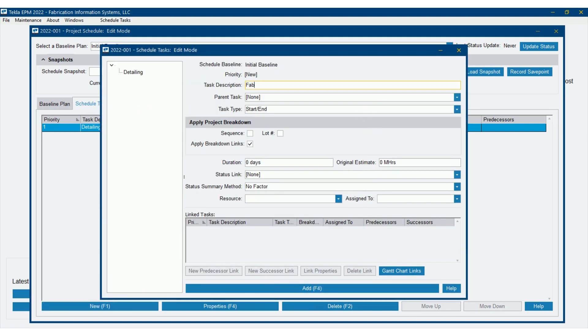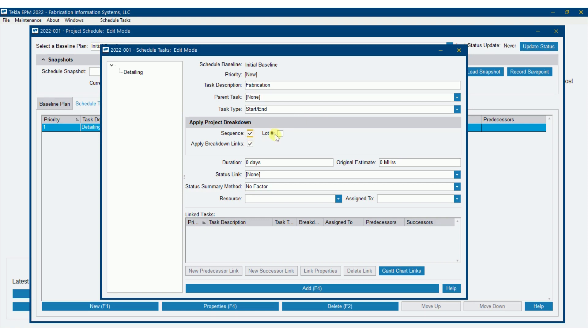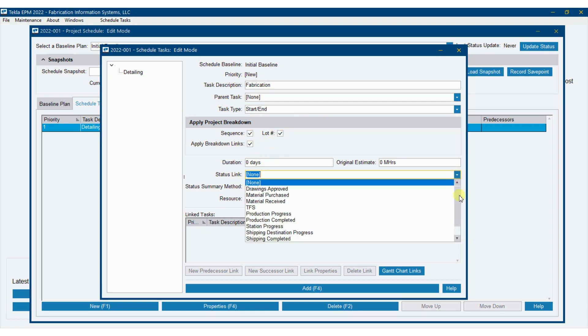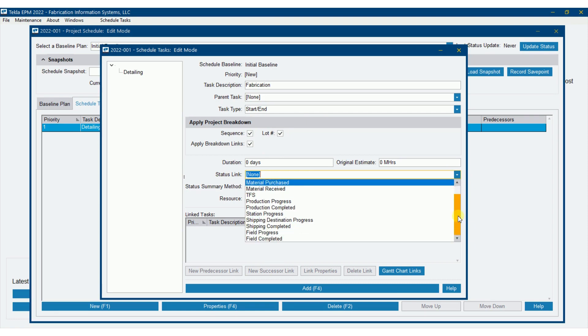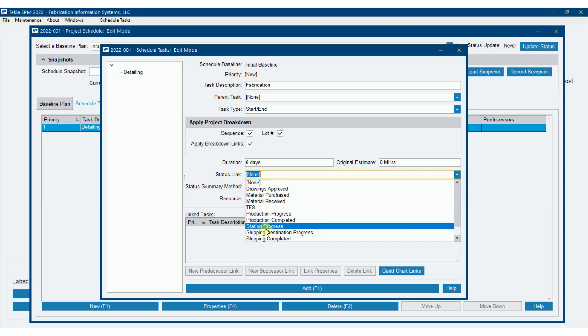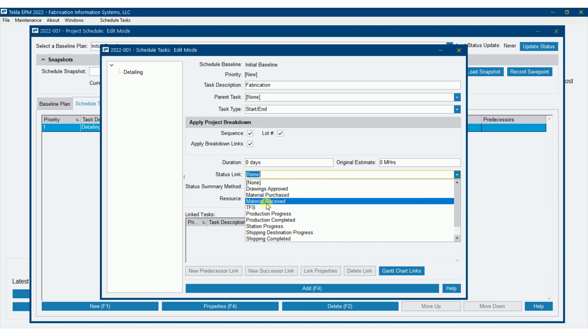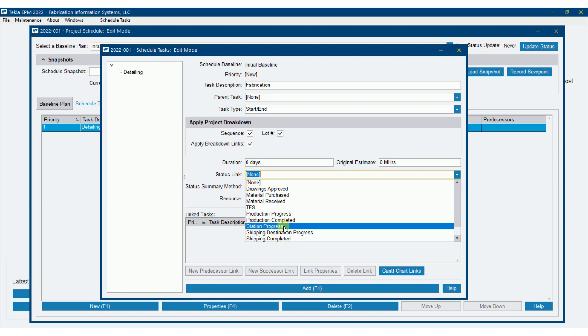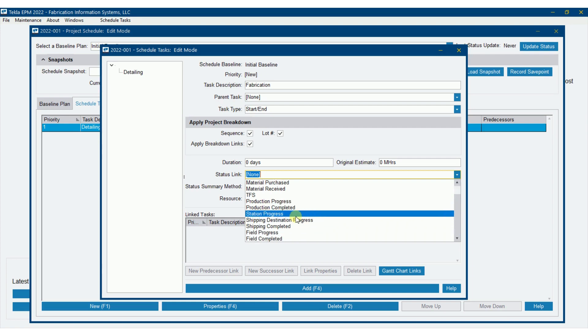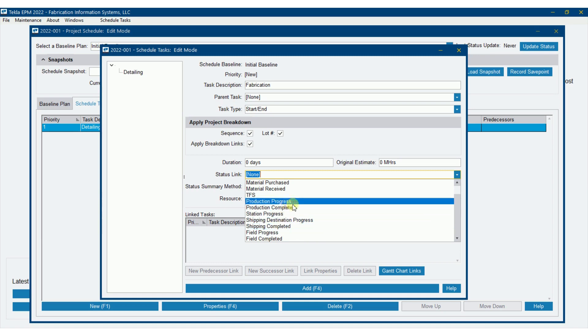So there's detailing. I'm going to add in fabrication. Still no parent task. In other words, it's not going to be a subtask or a child task to detailing. This is its own task. We'll leave it a start end and we'll break it down. And my status link here, notice there's bunches of options here and you do not have an opportunity to modify these. This is the ones you have to choose from. Material purchase, material received, what's been taken from stock, production progress, production completed is where I probably want to do this. Now I could do station progress as well, pick a particular station to track for this task. Station progress. So lots of options here, but I'm going to choose production progress here.